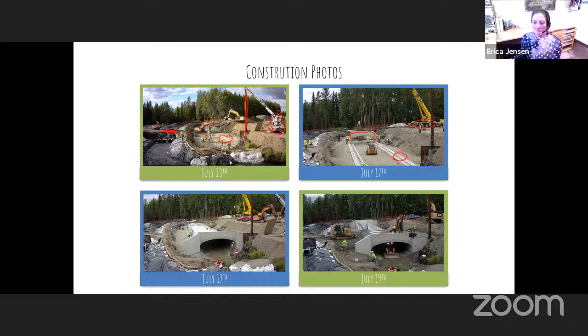What they did is they lifted the sections down on the north side of the roadway, and you can kind of see there are little rollers in here. You can kind of see those, and they would push the sections into place towards the south so that the crane had more clearance behind our side of these overhead lines that were there. So they actually pushed all these sections into place.